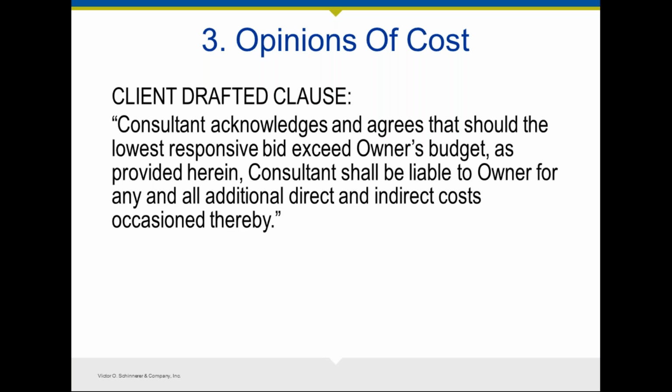Now, I didn't come up with these clauses just because I have a creative bent and put myself in the shoes of an owner. This is actually something that a client presented to one of our firms. And language such as this puts a lot of risk on you. Number one, you don't know what current market conditions are. So the lowest responsive bid could very easily exceed the owner's budget.